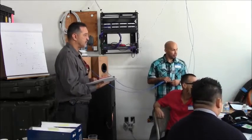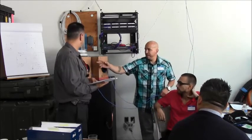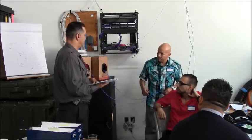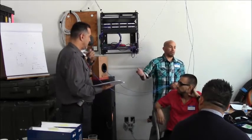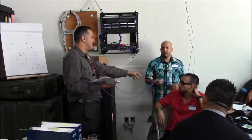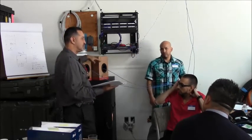You have a question? Yeah, so when you're labeling it again, you label one A or one C? Yes, you label it again, and it's going to be like you eliminated 1A and 1B already. So you look on your print, what's next? Okay, 1C and 1D, that's next. So you're always looking at your print. He should have labeled that the same number so they're identical, before he even cuts this.